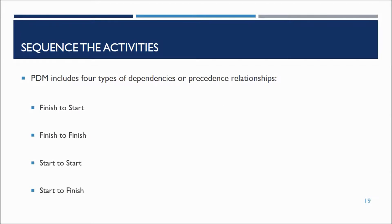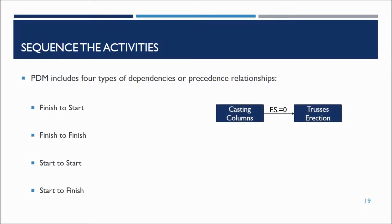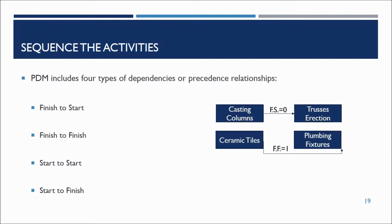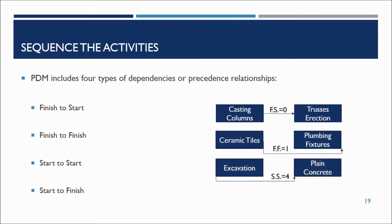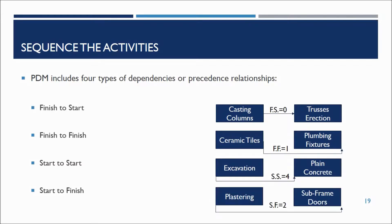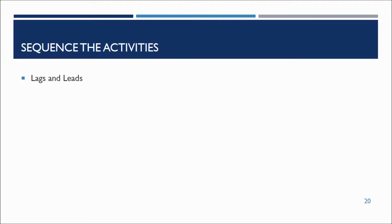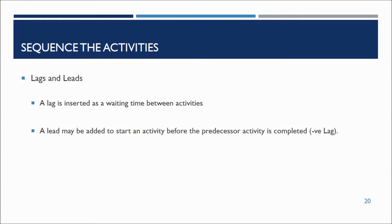The precedence diagramming method includes four types of dependencies for sequencing activities: finish-to-start, finish-to-finish, start-to-start, and start-to-finish. For example, trusses will be erected after casting the columns. Plumbing fixtures will be finished after finishing the ceramic tiles by one day. Plain concrete can start after four days of starting excavation. Plastering activity shall be started to fix subframes after two days. In these examples, lags and leads are used. A lag is a duration inserted as a waiting time between activities, while a lead is a negative lag that may be added to start an activity before the predecessor activity is completed.